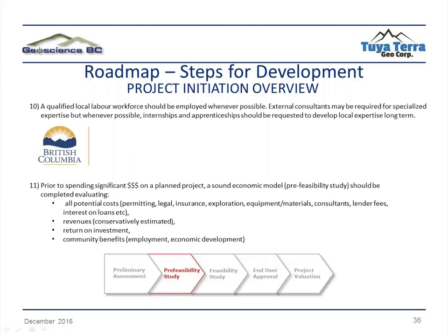Now, we have to also remember that we're going to need money for this. As we move along the development process, we've done a preliminary assessment, we've now looked at our pre-feasibility study, and we now need to move into a feasibility study. We need to think, what money do we need to make this happen? And when we're talking about all the money, we have to take into account it's not just the people working on the projects. We're going to need insurance, we're going to need permitting, we're going to need some legal help. There are many inputs that need to be considered when we're putting together our financial model.